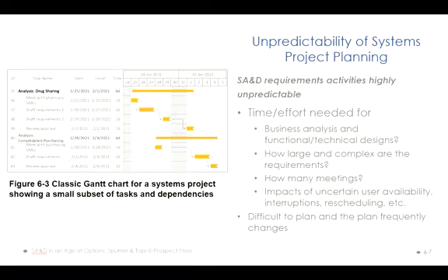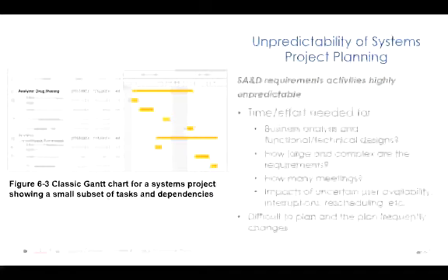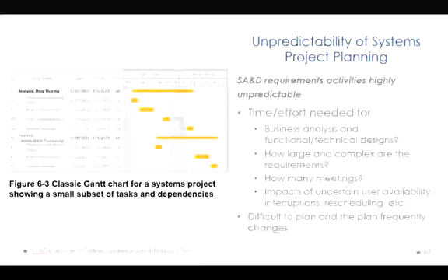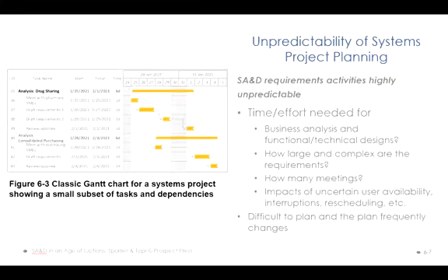Say, for example, you ask a programmer to write a piece of code, and that piece of code happens to be very difficult to write, so you may provide some sort of estimate or some flexibility. Instead of saying we're going to write that module in 1 or 2 days, you give the programmer somewhere between 1 to 5 days, and you can map that kind of flexibility in a modified Gantt chart as well. Nonetheless, if the uncertainty is too high, this type of chart will be totally unreliable.